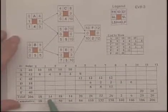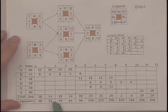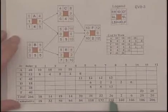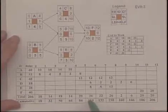Here's our completed time-phased budget for our project. Notice down here we've cumulatively accumulated the costs over each of the weekly periods, and we now estimate that the total cost for this project would be $206,000. Also notice that the cost varies by time period, and here during these two periods has the most expenses, the highest cost, while this period has the lowest cost.